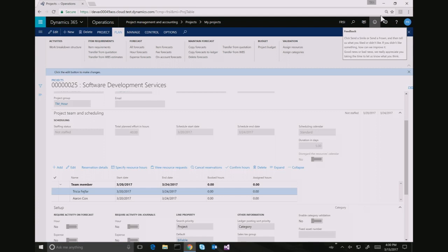She will show up as overbooked, right? Yeah, first past the post. Once approved, she becomes hard booked for this project. And if she already has another hard booking in another project, she becomes just overbooked. So what happens is that if, in the process of doing the request, Trisha has been booked to some other project while being requested, the resource manager, when